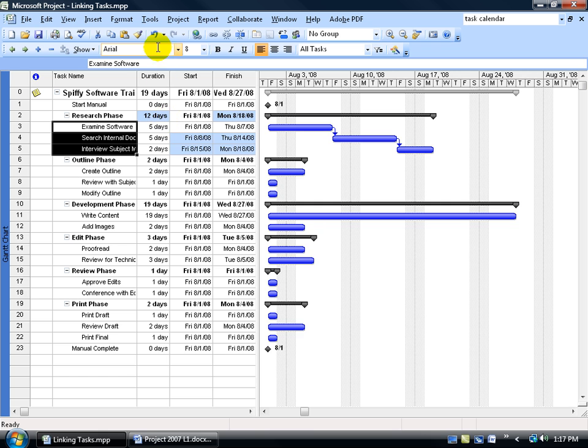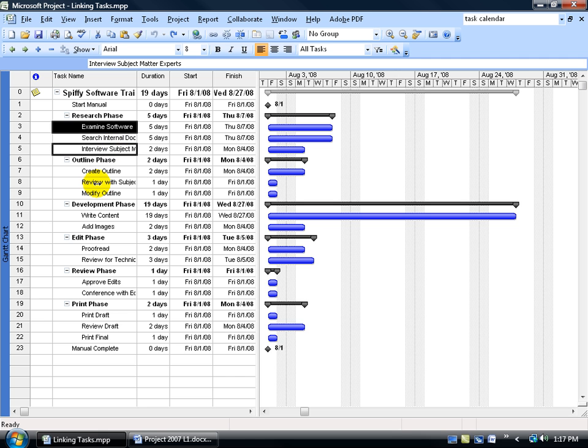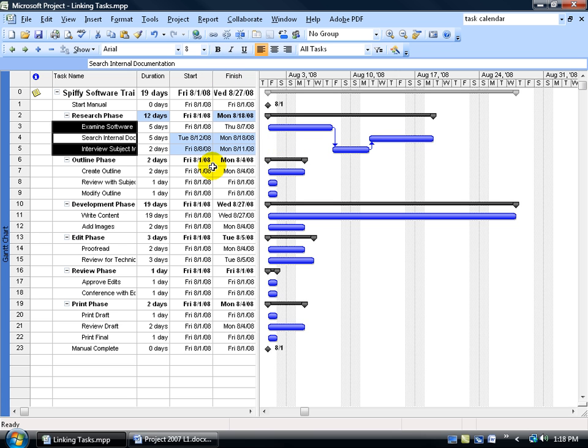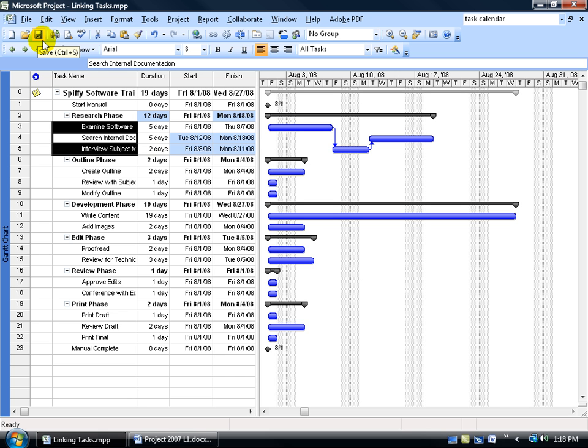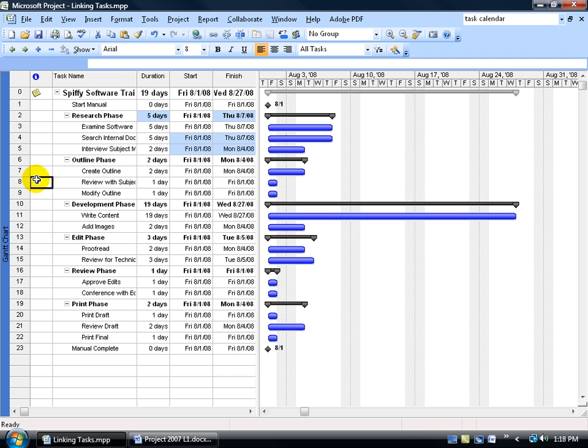What I mean by that is when I hit the undo button, and I go, okay, let's see. I want to link this task to the next one. And, whoops, I missed. I clicked that one down there. And, oh, let me go ahead and back up and hold down the control key and select that one. The order that I selected them in is how they're going to be linked. So when I click on the link button, look how it works. I selected this one first. This task down below second, which is down below here, then it has to go back up to the middle task here. So if you're running into problems like that, you can either hit the undo button, or if you already hit the save button and the undo button is no longer available, like it just did there, go ahead and make sure you've got them selected and then say unlink them or break the links. And then click off in a blank area and start over again.